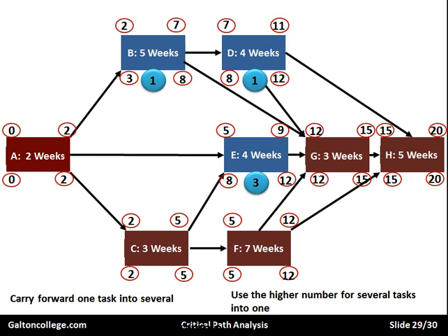Now I appreciate that the numbers here look a bit confusing, but once you remember to take the largest one forward going across the top, always take the largest, and take the smallest coming back, you can't really go wrong. The diagram I've given here is somewhat complex. We've got lots going on here.